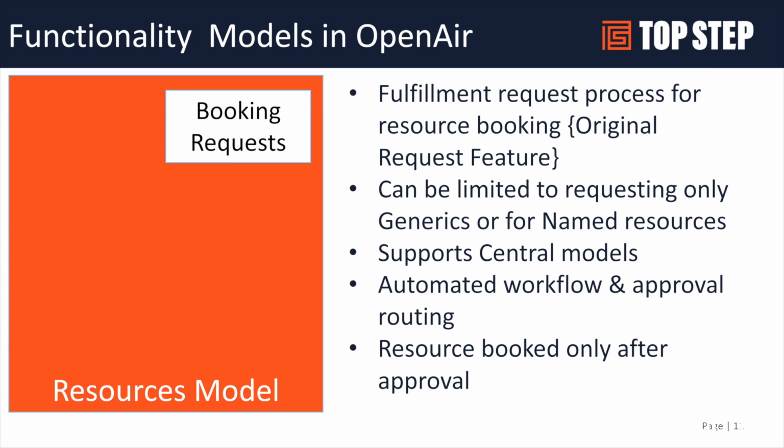This is more of a decentralized model where you have the concept of a booking request. So this is an older feature. It's been around OpenAir forever. We really don't recommend it very often when we're talking to customers, as there are some limitations. But basically, the idea was being able to have a formal request and then a formal approval and fulfillment of that request. Out of the box, it can be enabled in the resourcing module, resource settings.